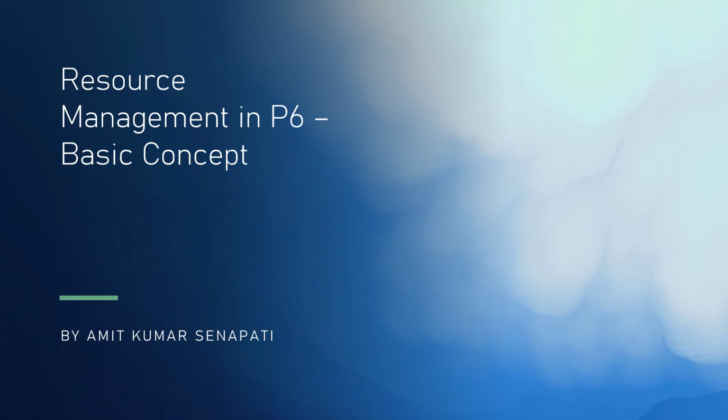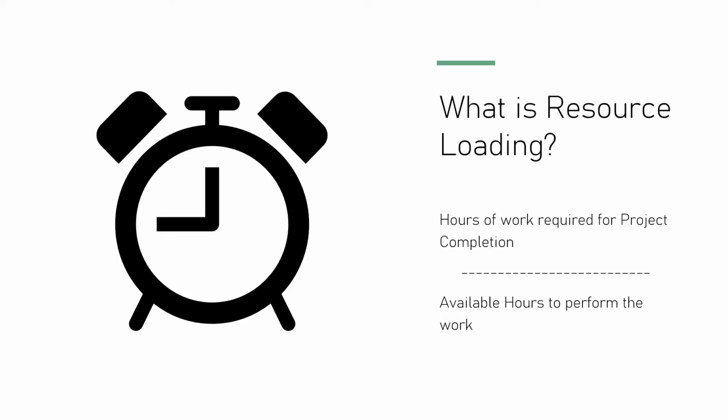Hi, good day. The topic is resource management in P6 and what are the basic concepts that we'll be learning today. What is resource loading? Resource loading is the hours of work required for project completion divided by the available hours to perform the work.